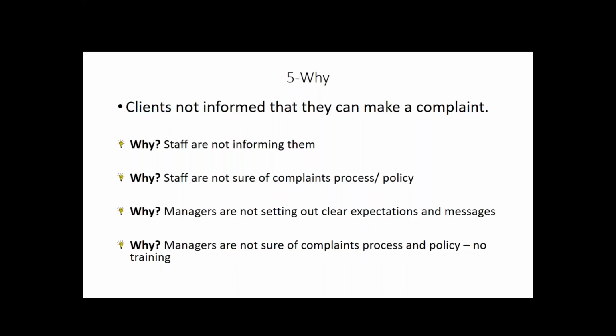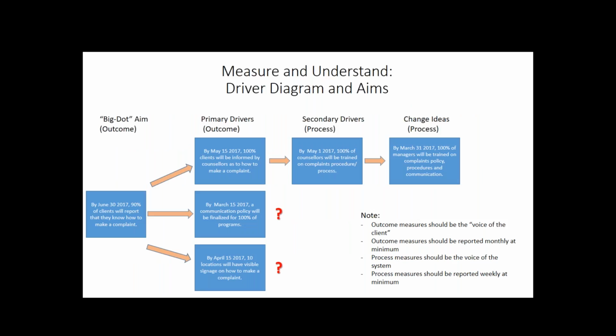So clients are not informed that they can make a complaint. Well, why is that? Well, staff are not informing them. Again, we ask, why is that? Well, staff are not sure of the complaints process and policy. And again, we ask, why is that? Well, managers are not setting out clear expectations and messages. And again, we ask, why is that? Well, managers are not sure of the complaints process and policy themselves. So it helps you get to a meaningful place to start to look at where you might make a change. Helps to focus a little bit.